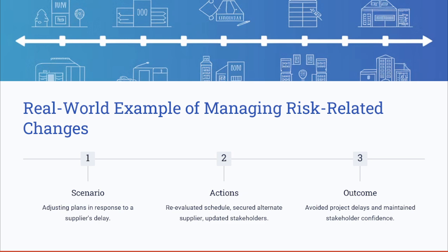By re-evaluating the schedule as a project manager, securing an alternative supplier, and keeping the stakeholders informed, the project team can successfully mitigate the risk and deliver on time.